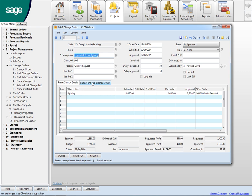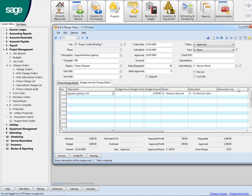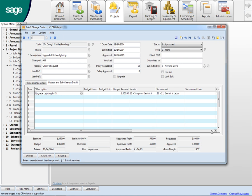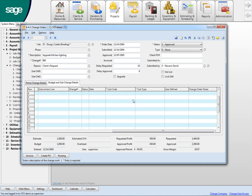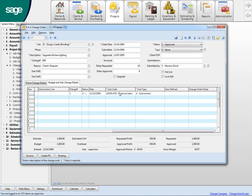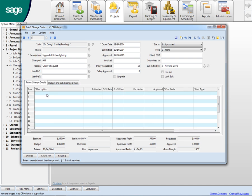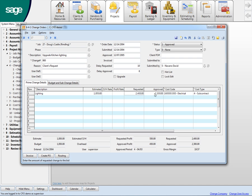In the middle, Ryan, there's two tabs. This is my budget. And this is who's going to get the work, Samson Electrical. They already had a subcontract. If I scroll across here, it's going to be change order number two for them. It's open because they haven't signed and sent it back signed yet. That's a cost code I want the budget to go to. This side is the same thing, but down from the owner side. So this is my cost from the sub was $1,850. I'm asking them for $2,400. They're going to probably come back and approve $2,300. They also approved eight days of extension up here.